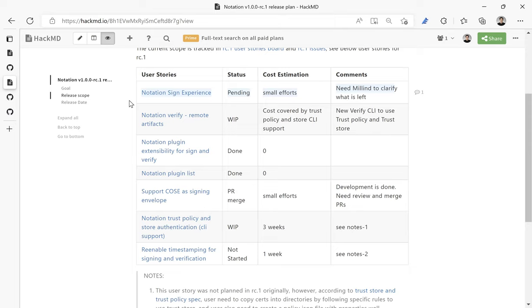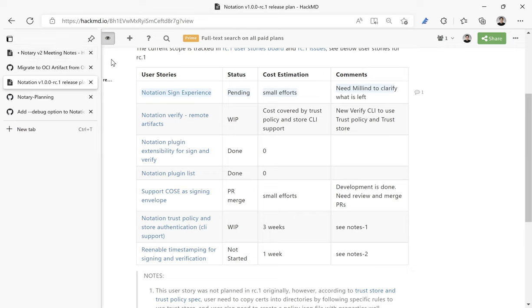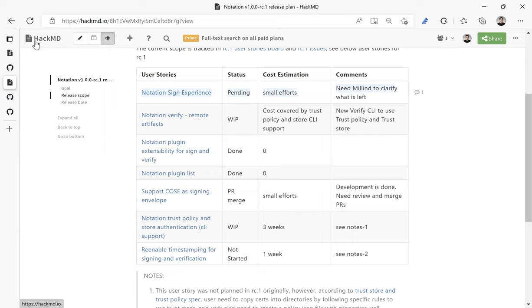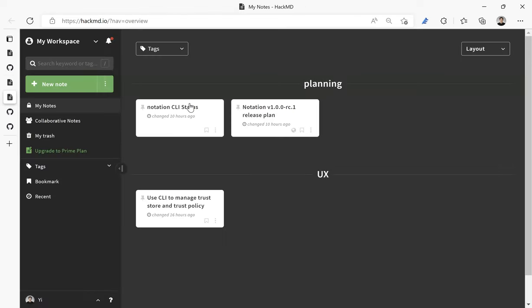Yeah, I'm not saying we need to rip out everything that is not there, but I do think we should at least agree that, let's just say, sign and verify is something we want. Then we just take the other ones and put a preview label or whatever else on them. And if it's so broken or unusable, then we can make a call at some point and say it doesn't even make sense to have preview on it. But if we try to go GA with all the subcommands we have now, it's going to be a really long time, right? Yeah, that's true. And so I really think we need to hone in on the scope of the most important ones and make sure that end user experience is really super solid, and tested and automated and whatnot.